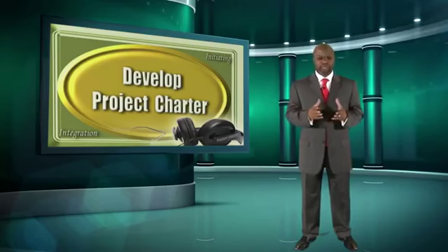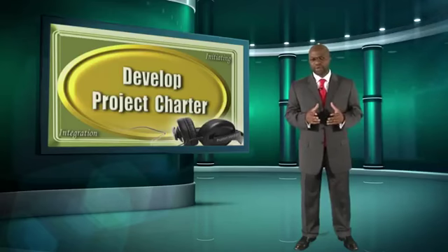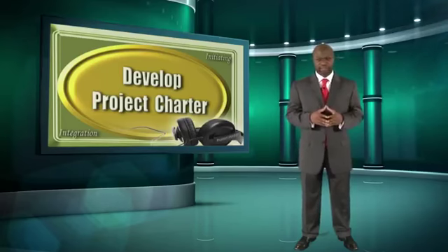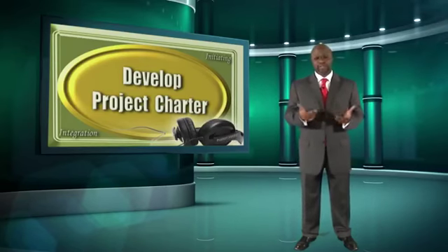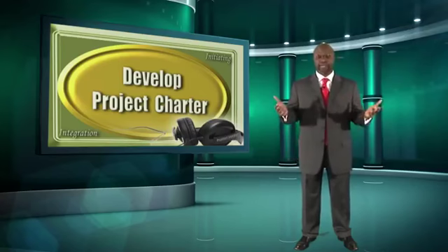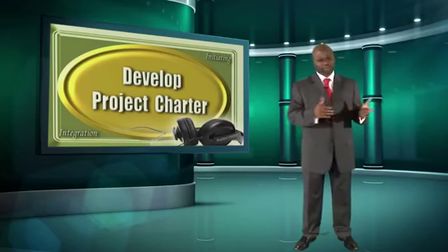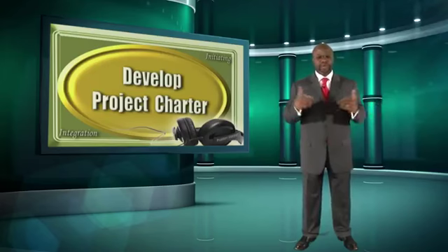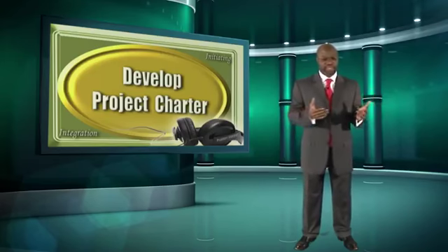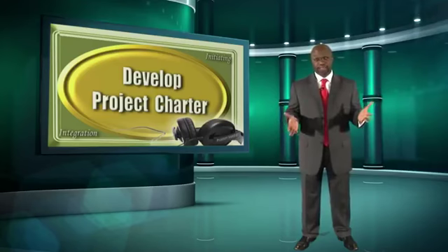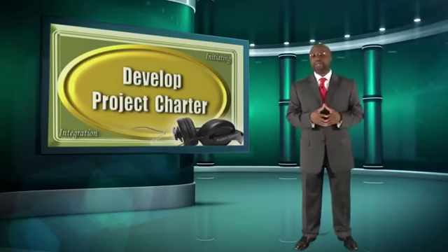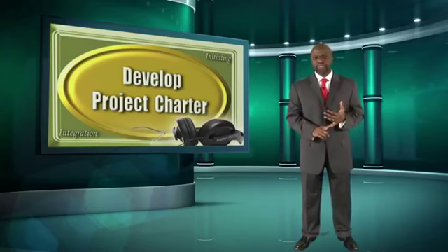Our next tool and technique is a new one. It's called Facilitation Techniques. Well, as the name facilitation implies, facilitation techniques are used to facilitate the development of the project charter. And these cut across project management, things like brainstorming, conflict resolution techniques, and so on. And what is our output from this whole thing? The project charter. The project charter authorizes the project manager to apply resources to projects.